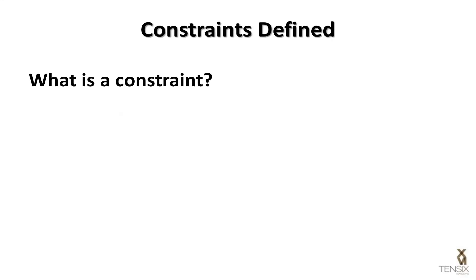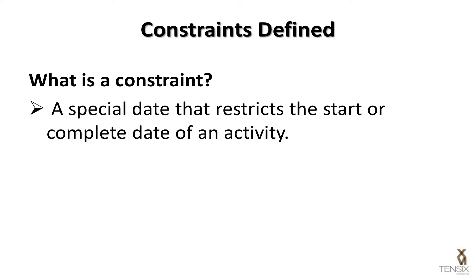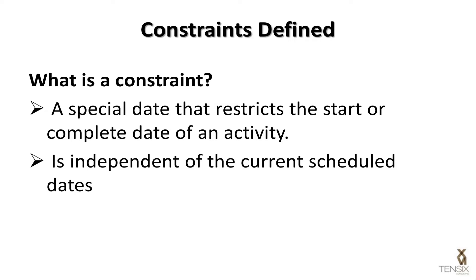So what is a constraint? A constraint is a special date that restricts the start or complete date of an activity. This date is independent of the activity's current scheduled dates.